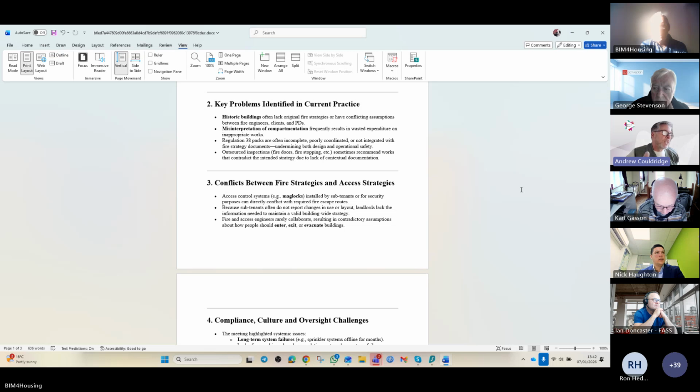And unfortunately, as a deliverable, what I ask for is a complete suite of information: compliance certificates, deeds of conformity, the full R38, the golden thread information that I need, full O&Ms. And currently, do you know what? I'm really happy if I get 70% of what I've asked for after 6 months of asking. That's okay. Without getting into the detail.